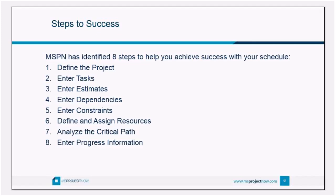Step one: define the project — setting options before you ever enter any tasks. Step two: enter those tasks. Step three: enter estimates, then dependencies, then constraints. Step six: define and assign resources. Step seven: look at your critical path. And finally, the last step is entering progress information, because the only constant in any project is change, and we need a living, breathing schedule with good forecast and accurate tracking information.